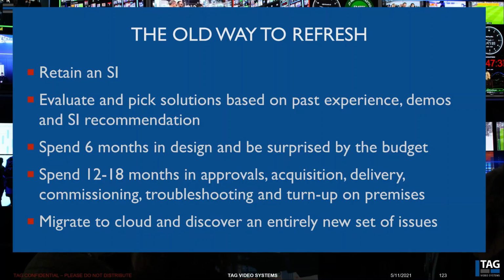And out of that, we would spend 6 months in a design phase and then end up often being surprised by the budget. We spend the next 12 to 18 months in approvals, getting that funding because it exceeded what we expected, acquiring the different technologies, having them delivered, commissioned, turned up, troubleshooted, and finally being able to put them on air. And that's not unusual. That whole process is 18 months, maybe 24 months if we even have to refresh the building it's going into.